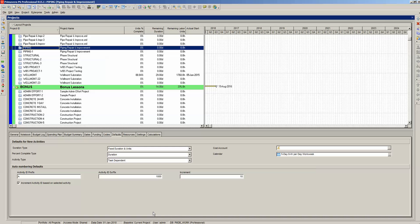We begin with the shell Primavera P6 schedule. A shell project is one that has been created but with no WBS and activities — essentially, it is an empty project. P6 begins schedule creation with the insertion of a WBS.